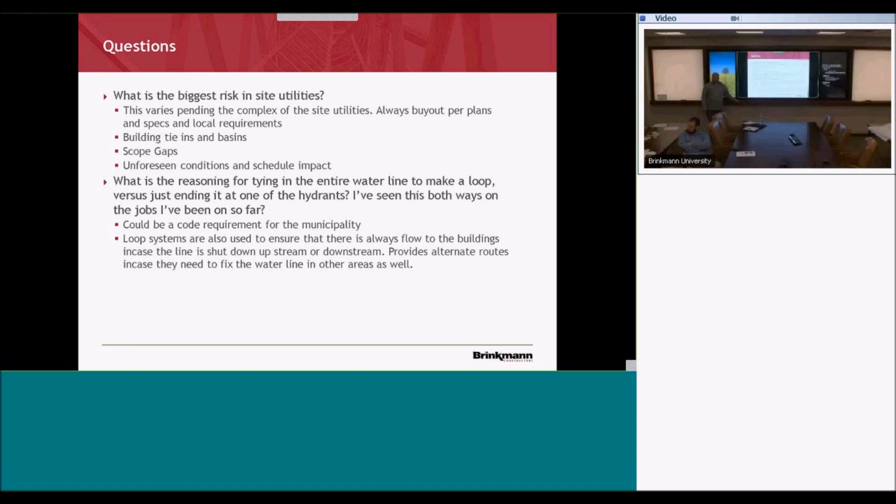Anybody know how much a geotech report costs? $5 grand. Yeah, the most expensive actually. Worth every time. You'll easily make that up by saving a change order. I brought up Kaiser,